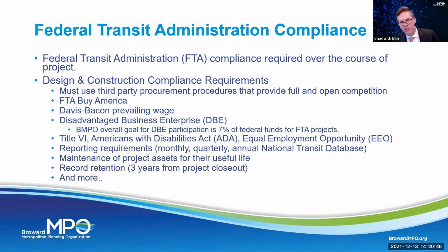But if you do choose to move into design and construction, that's something where, again, either use MTech or the city or applicant themselves lead that. And there's a number of things that you need to keep in mind during that. First and foremost is that third-party procurement procedures need to be followed. That means there needs to be full and open competition. So again, no short bids. We like at least 30 days for the bid to stay open. And again, it just needs to follow that full and open competition.